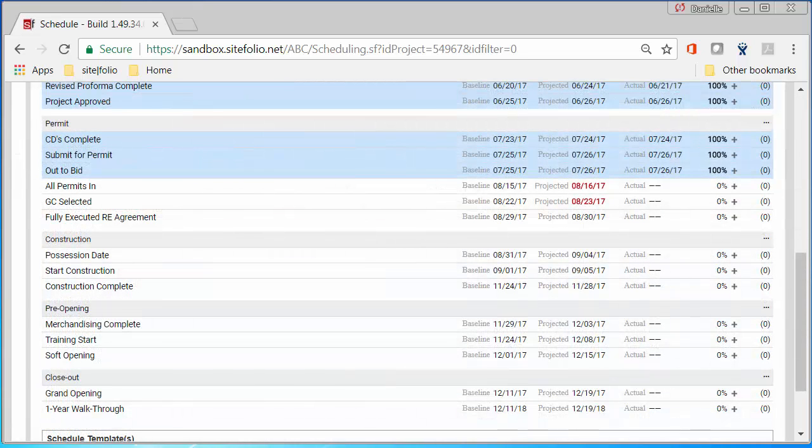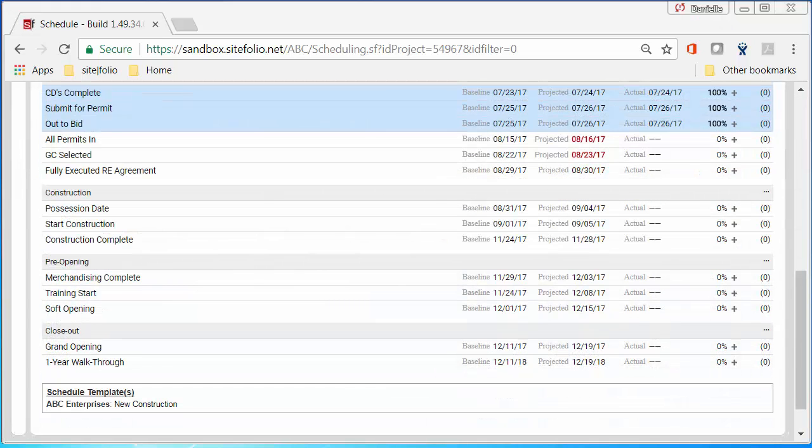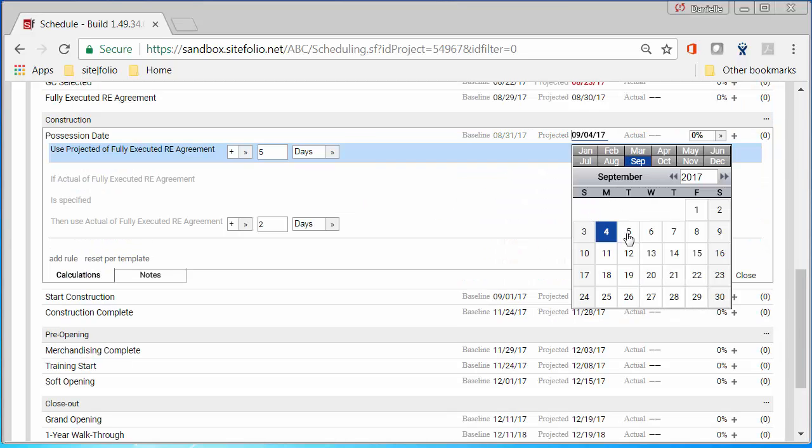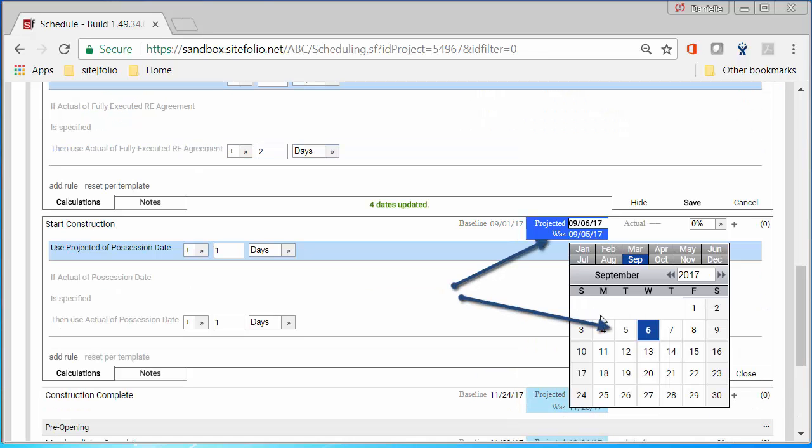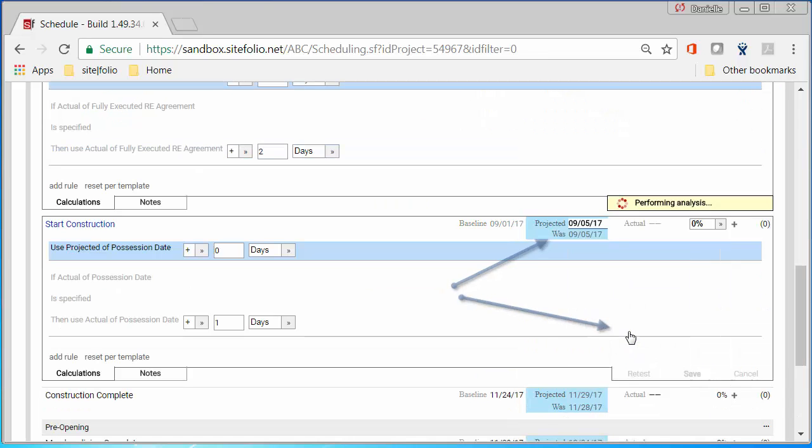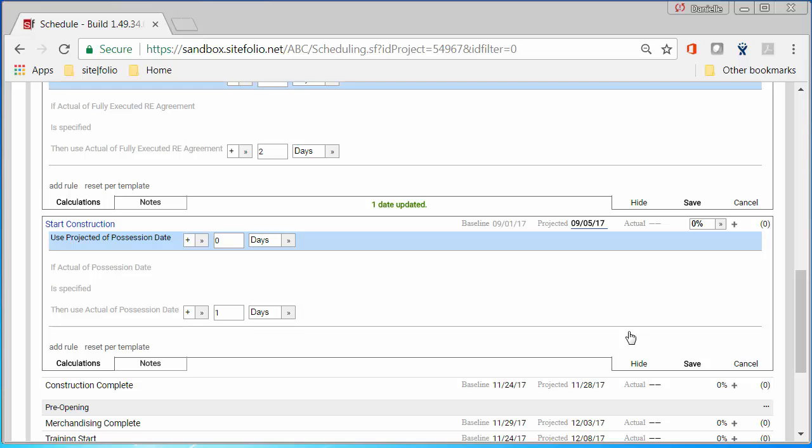Let's do this again. I change a milestone date, but this time I don't want it to impact any other milestones in the schedule. To do this, I adjust the dependent milestone back to what it was and save.